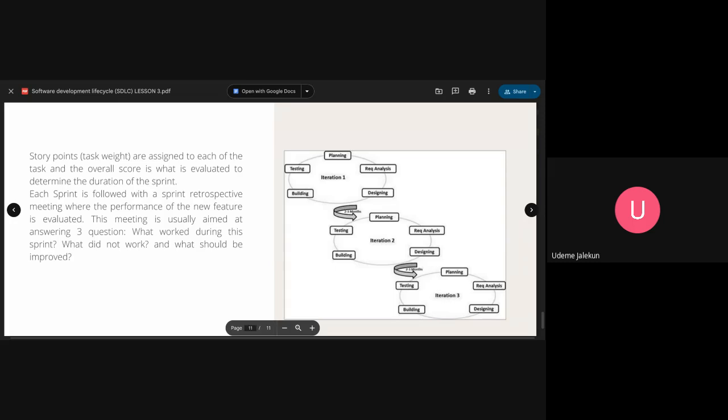How long will it take us? Another 3 weeks. You see that she has spent a shorter time. 3 weeks plus 3 weeks is 6 weeks, less than 2 months. Juliana can now come and advertise: Hey, mothers, I have a product for you. That's why you'll hear things like version 1 of the project, because the product is not complete yet. But because she wants to launch to market faster than Esther, she would get under 3 months the same customers Esther would have gotten after 10 months. She will then do agile and push it.